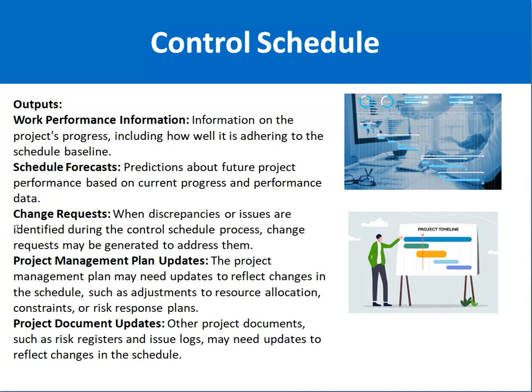The outputs of the Control Schedule process begin with Performance Information — information about project progress, including how well the project is adhering to the schedule baseline. This is very important to determine whether the project is on schedule. Schedule Forecast is another output: based on current progress, you can predict how much time is required to complete the project. Change Requests may also be generated if discrepancies or issues are identified.